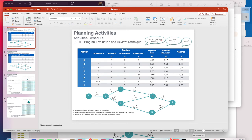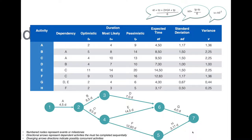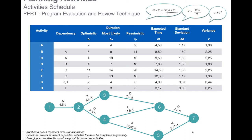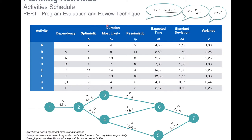We just saw a one-point technique, which is the critical path method. The critical path method is called a one-point technique because we work with only one possible duration for each specific activity. The program evaluation and review technique, the PERT method, is a three-point technique — because we work with three possible durations for each activity.